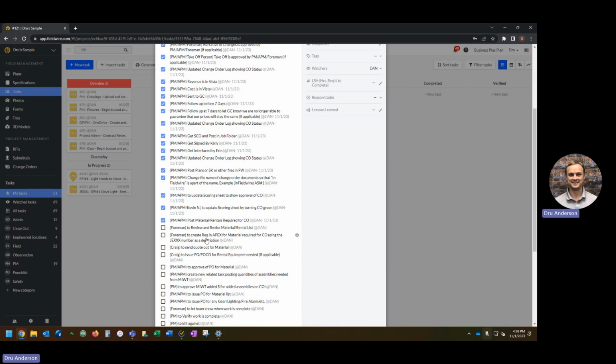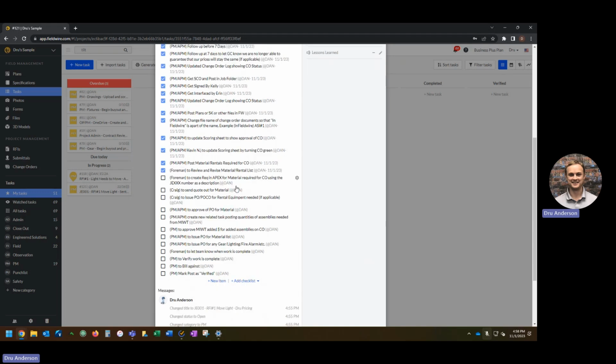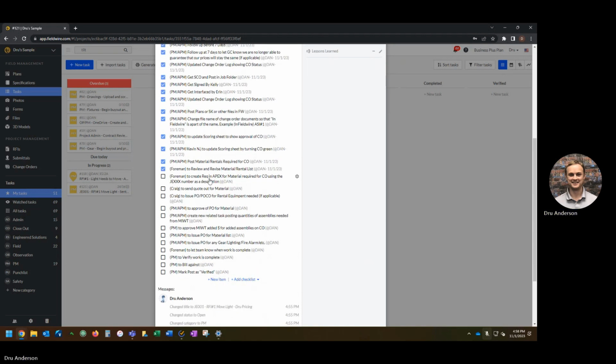We're going to say what material and what rentals we had in the change order. We're going to send the material list and the rental list to the foreman for them to review, just one last time before we actually put the rec in to Craig.